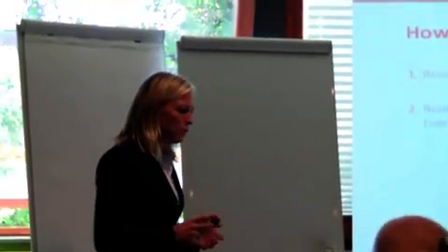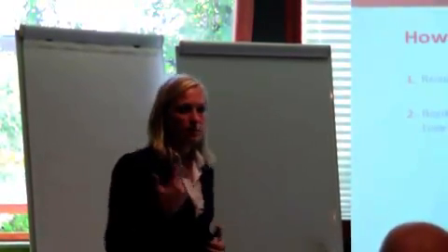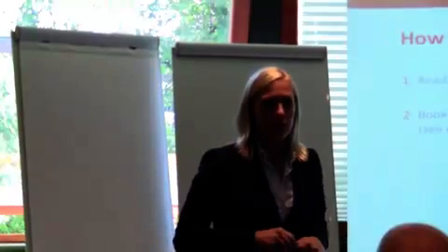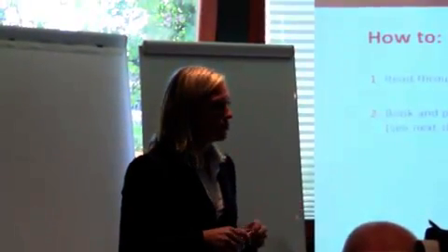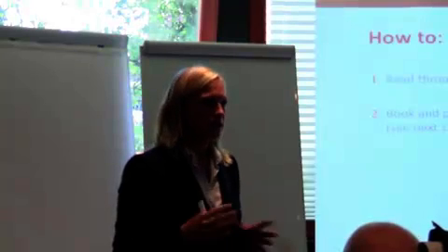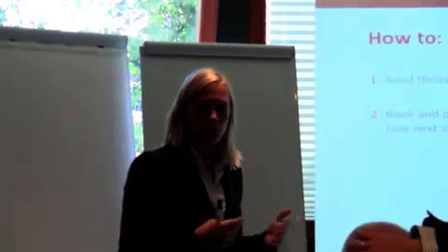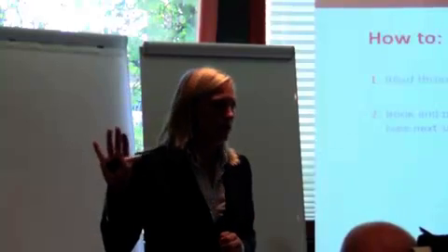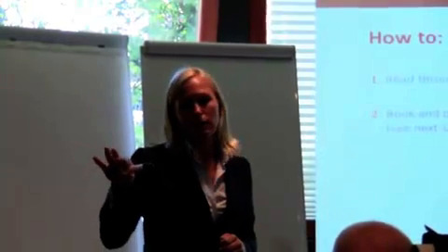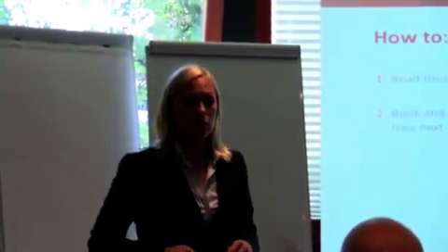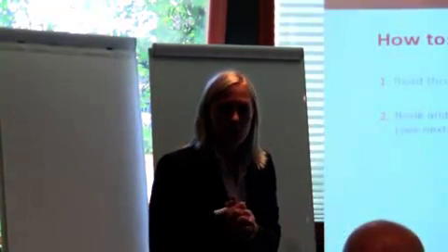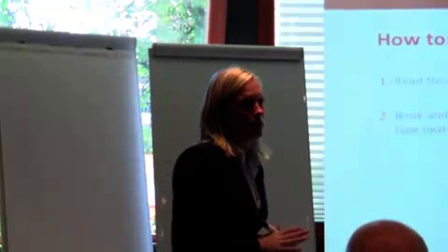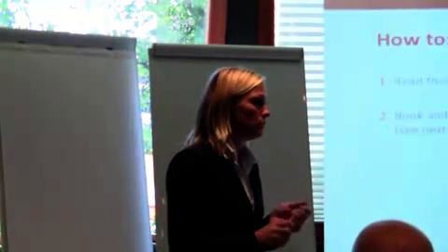And after doing that, plan together with the customer what should be covered during the workshop. You need to discuss in detail what the customer should prepare and what you should prepare, what process to cover, because that affects which people should be present in the room. You cannot come there and say, well, what process should we look into here? That should be prepared beforehand and decided on together.